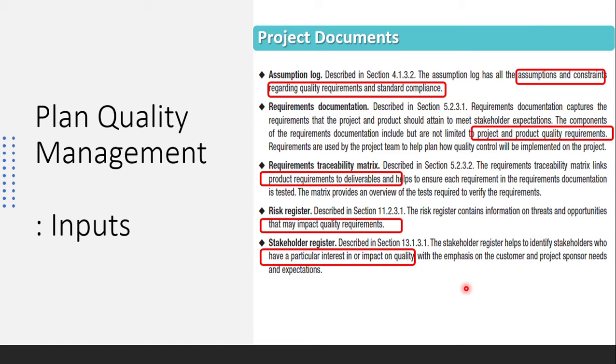You as a project manager, the stakeholder register will be a prime document to understand the quality requirements of your project, because the stakeholder register will tell you who the prime stakeholders of your project are, and with that you will have a good idea about their risk appetites and their tolerance levels, and particularly their interest in certain quality requirements. So maybe the customer's enterprise risk manager is also one of your main key stakeholders. Then definitely he is going to lay down certain quality requirements on you.